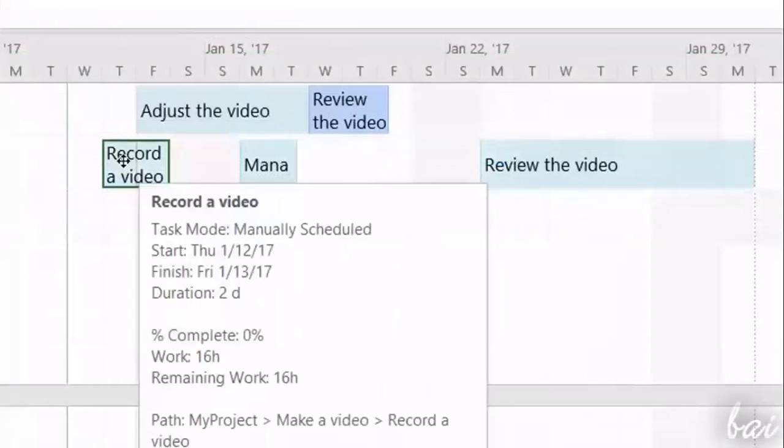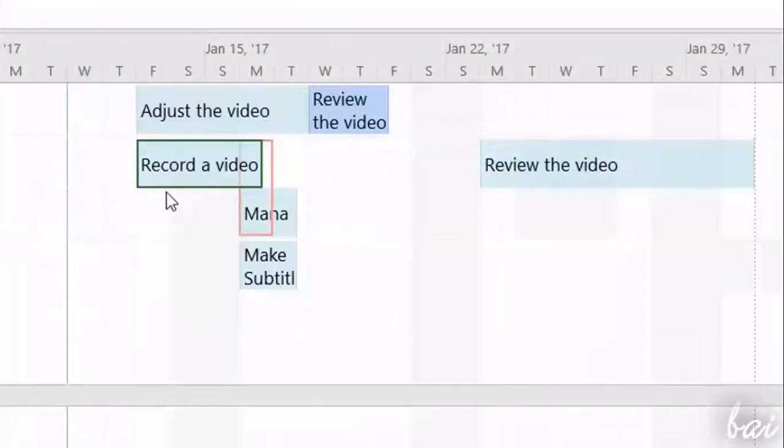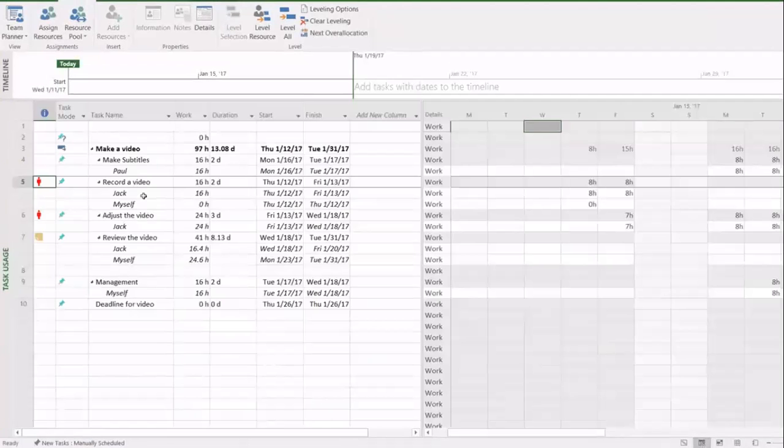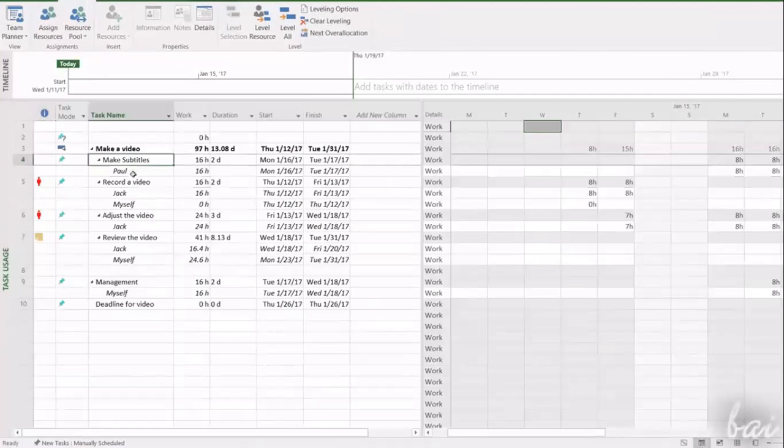While assigning tasks, Project highlights bad entries through a thin red contour. For example, when a task starts on a non-working time, or when you assign too many tasks to a single resource, making it over-allocated. In case a resource is over-allocated, you have to distribute the daily working hours in the correct way. If you go to the Task Usage workspace, you can check day by day the total working hours per resource for each single task.